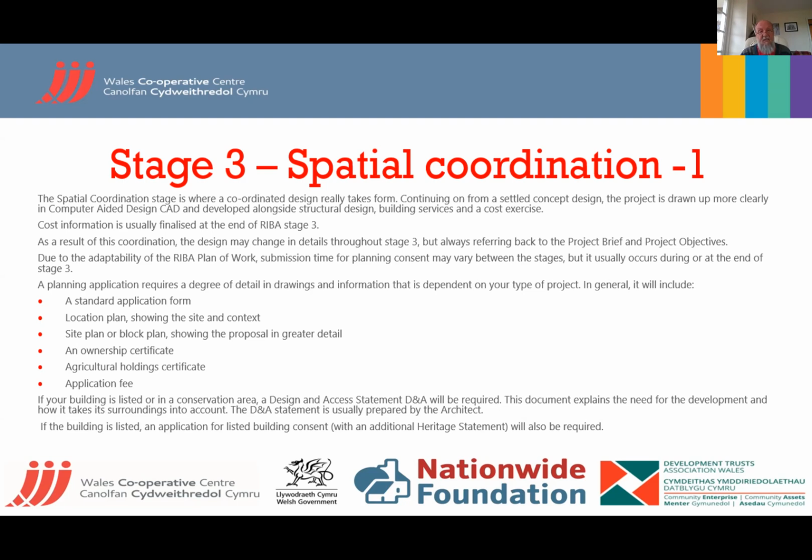If it's a listed building, then there's an additional heritage statement. And you would have had close liaison with the conservation architect within the local authority as to what they would be expecting, and CADU and anybody else that was involved. And that does put time and cost on any planning application.